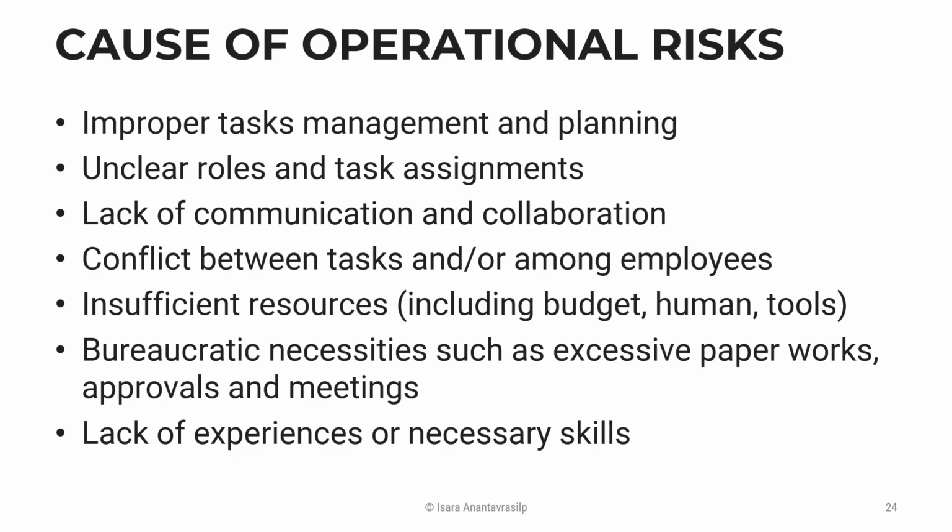Misunderstood requirements, for example, if some requirements are understood by two people differently, and you are not sitting in the same place, you're not talking to each other, and these two people are working on different components like front end and back end, it could cause some defects in your software. For example, the front end understood that you need to output some result, but the back end produces an incorrect result. This could cause some fixes later, right? And of course, some delay.